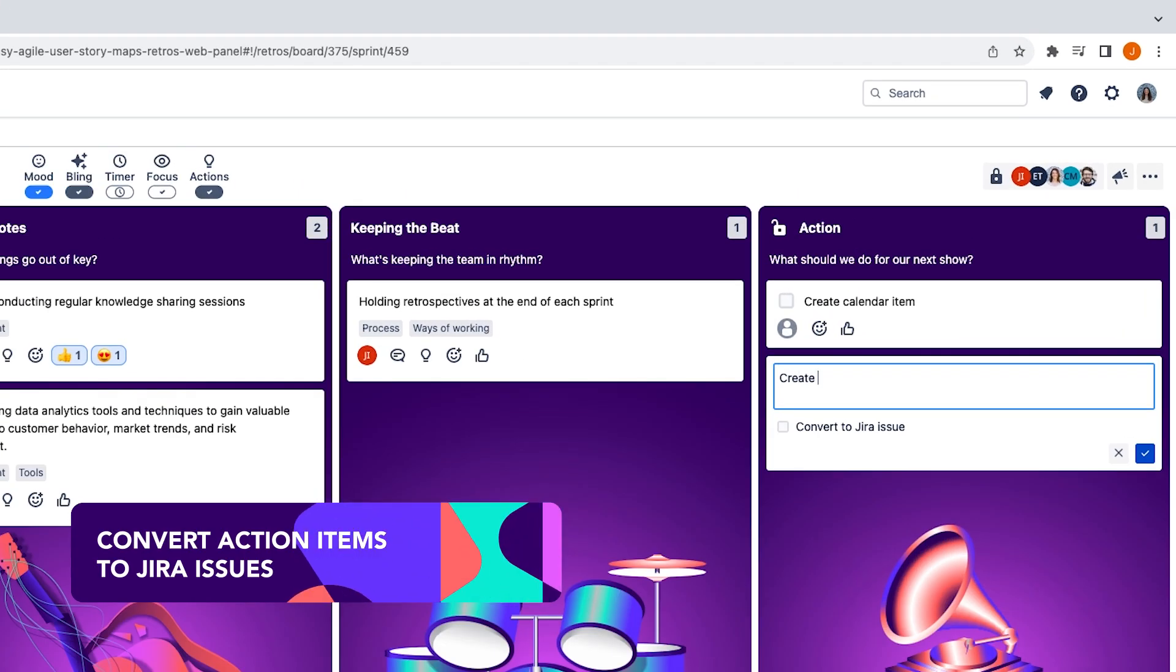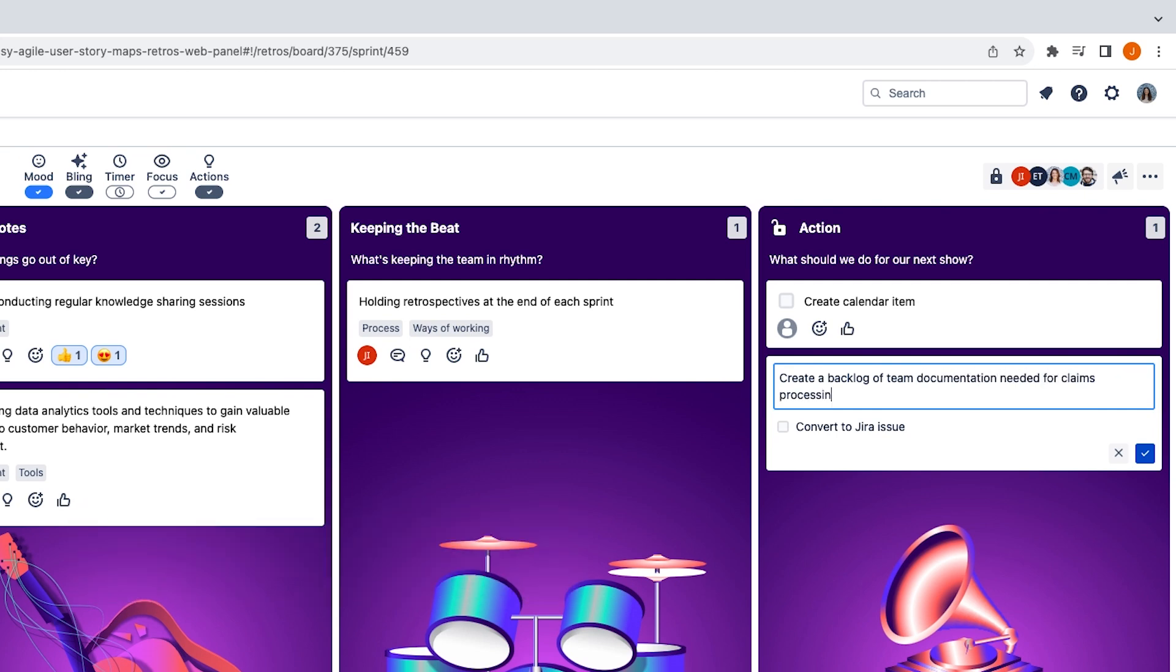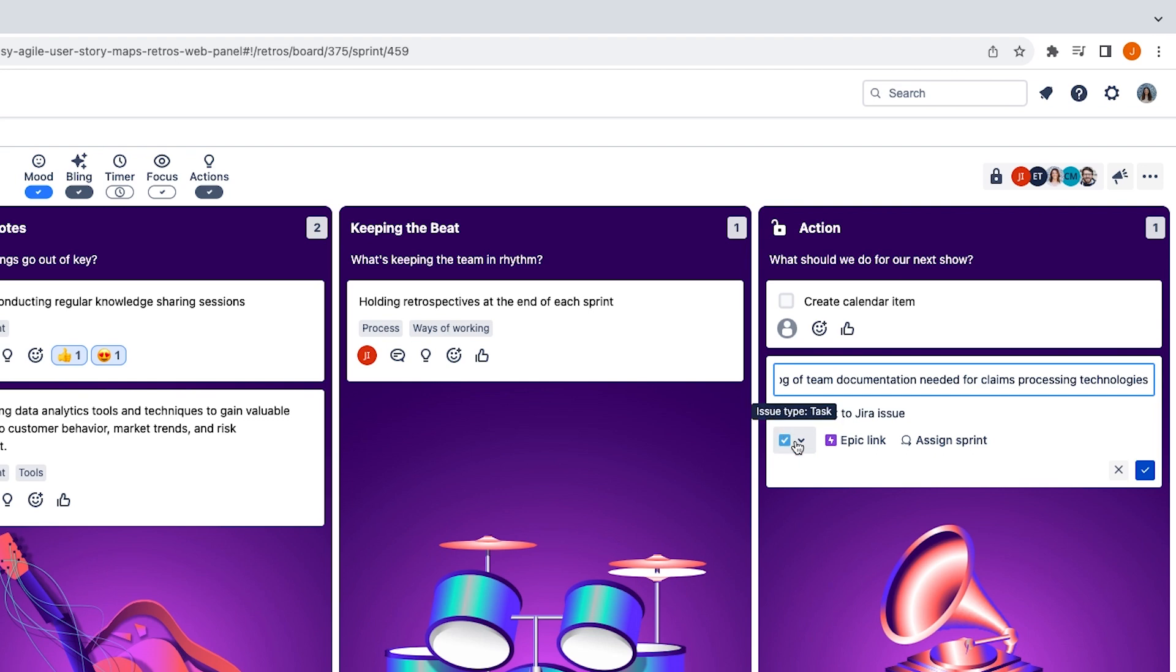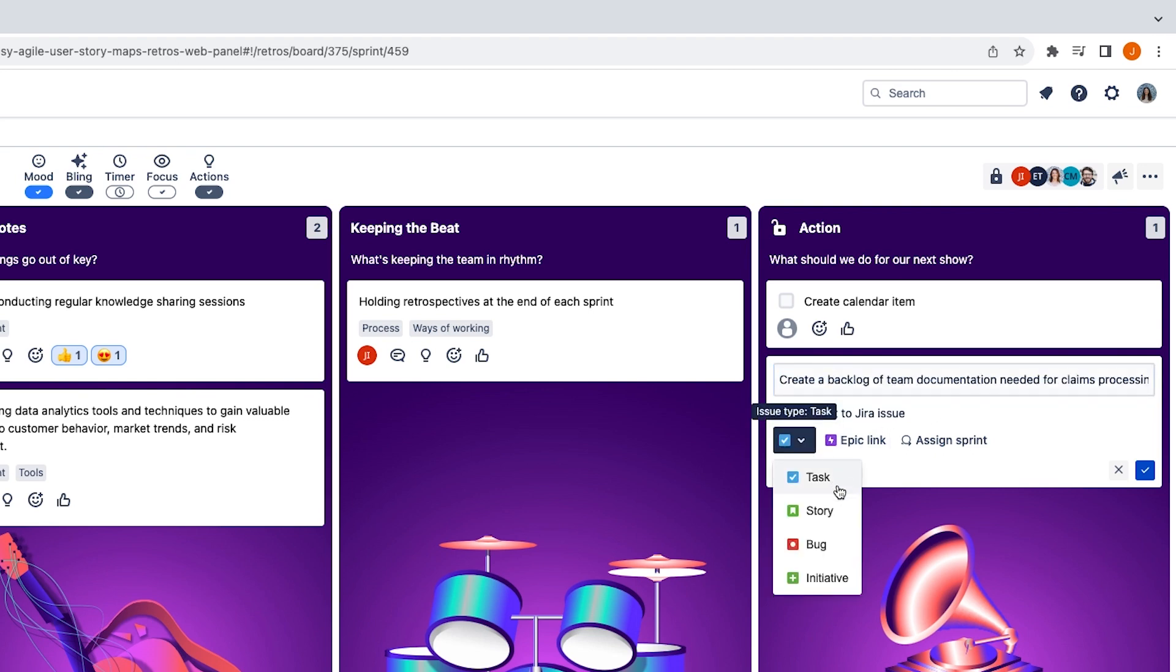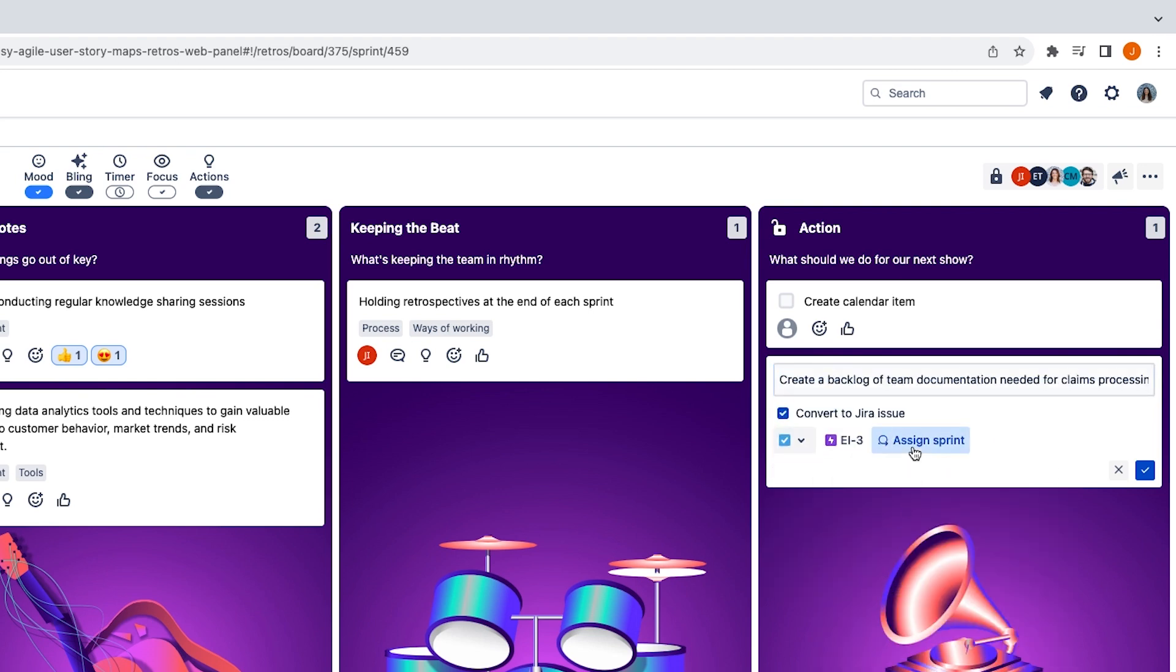From our retrospectives board, not only can we note down an action item right here on the board, but we can also convert it to a Jira issue, select its issue type, link it to an epic and schedule it into a sprint.